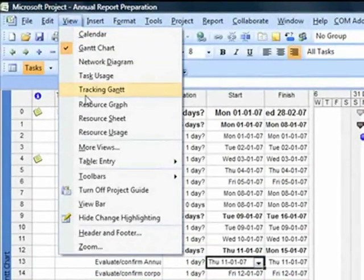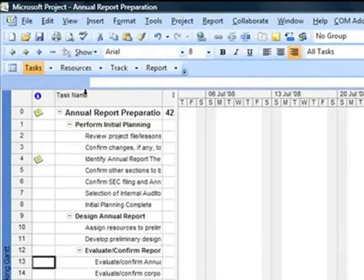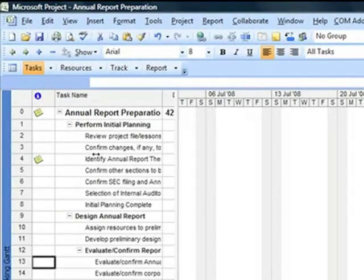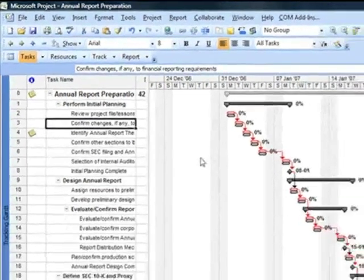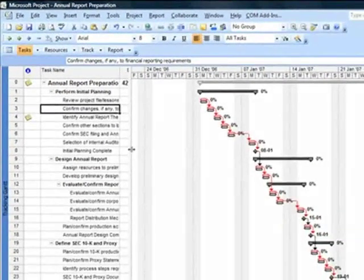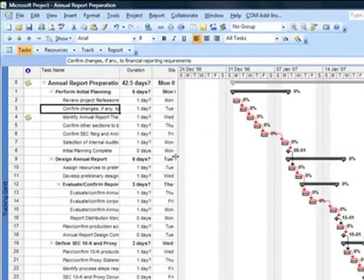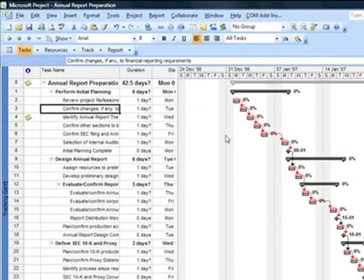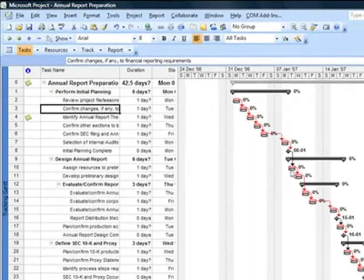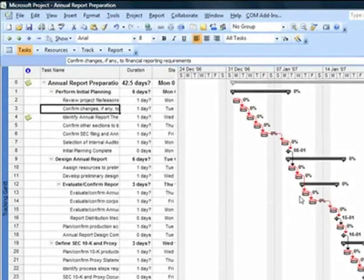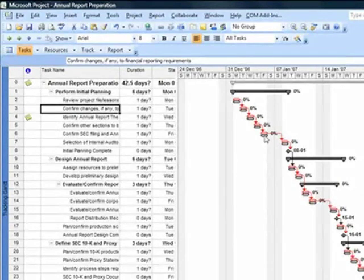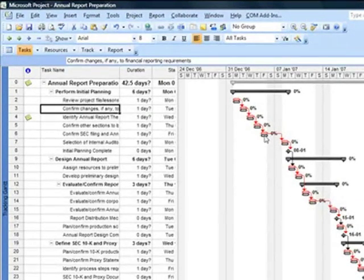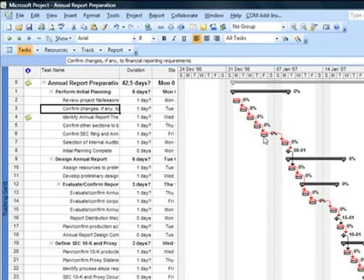Secondly, from the View menu if I choose Tracking, this view also allows me to see the impact of saving a baseline. If you see here carefully for each activity now I am able to see two bars: a black one and a red or blue depending upon the criticality. The black bar is always the baseline bar, that means my planned schedule.